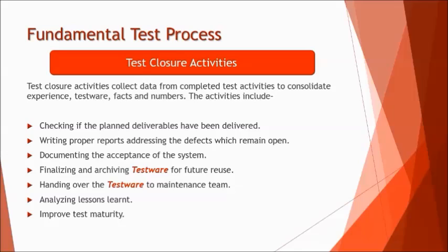Documenting the acceptance of the system, which basically means that the client would have conducted acceptance testing and has accepted the application, then on what grounds, because we do have a lot of multi-level acceptance of an application, like contractual acceptance, operational acceptance, or maybe just the functional acceptance or business acceptance. So what exactly are the different levels on which he has accepted the application? We document those as well.